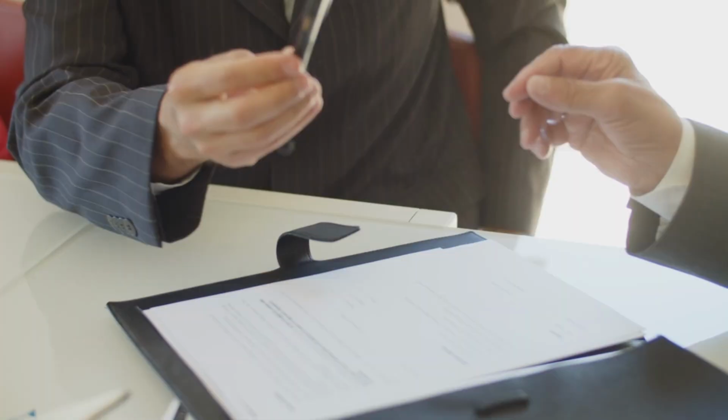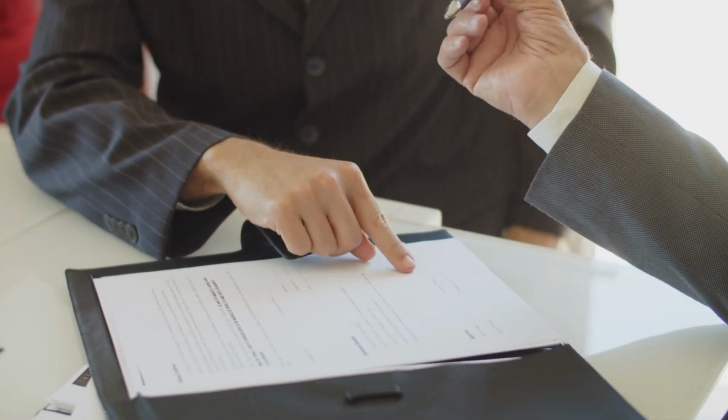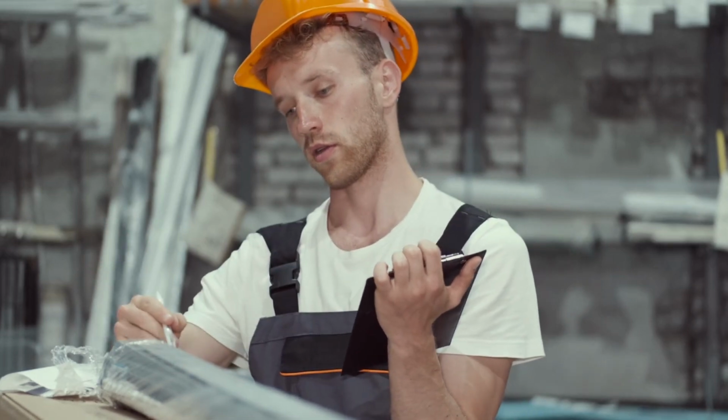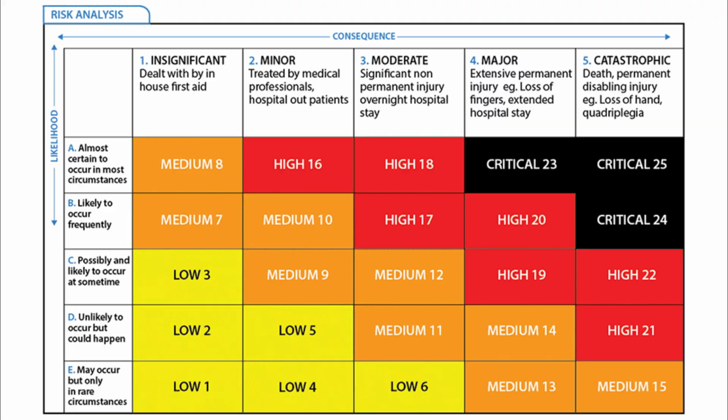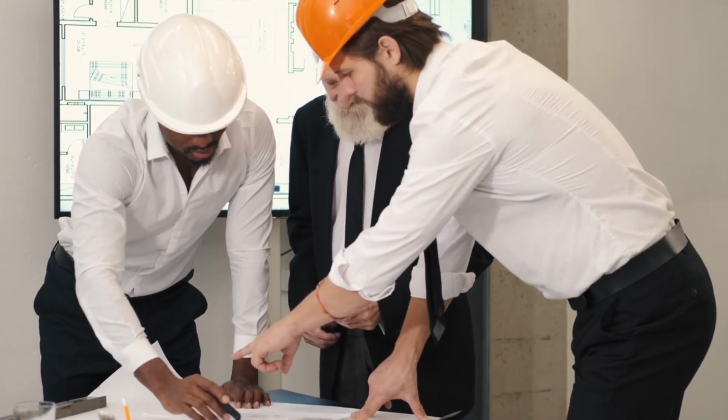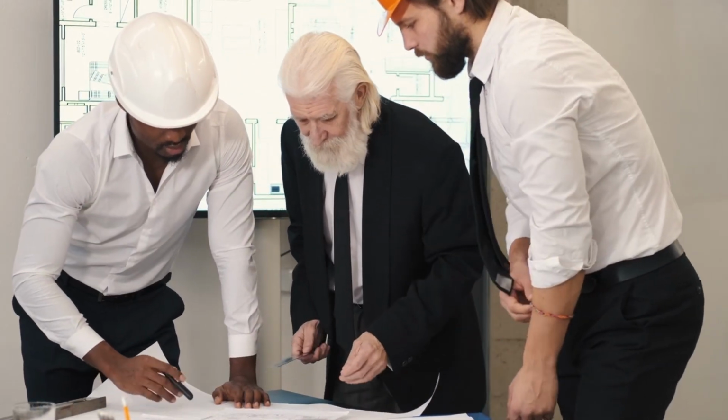Transfer, shift risk through contracts or insurance. Example, subcontractor agreements, warranties, insurance coverage. Accept, acknowledge risk, and monitor it with contingency plans. Example, minor risks with low impact. In construction, reduction and transfer are common, but avoidance is also a valid business decision when risk is too high.